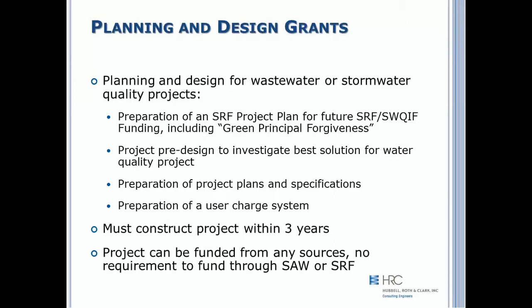If a grant is accepted for any of these items, a project must be constructed within 3 years. The project can be funded through any source. There's no requirement to fund it through the SAW or SRF program. However, if an applicant does wish to get a SAW loan for construction, it needs to be a project that is identified in an asset management plan.